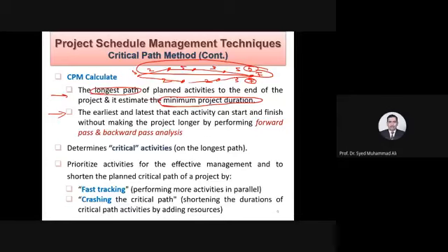So you need to know the longest path. That will be the critical path. And you will see, for each activity, we will find the slack. How much flexibility, how much variation is permissible without delaying the project. We will see that. All the activities on the critical path will be called critical activities. So just imagine, if you are a project manager, I just gave you the example of a road site. So structures are being constructed.